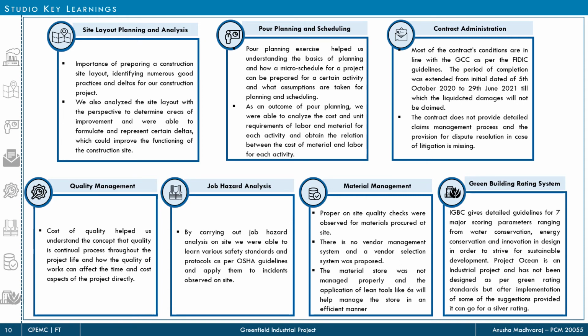And next, in contract administration, we noticed that most of the conditions are in line with the GCC as per the FIDIC guidelines, and that the period of completion was extended from 5th of October 2020 to 29 June 2021, till which the liquidated damages will not be claimed. And under quality management, the concept that quality is a continual process throughout the project life, and how the quality of works can affect the time and cost aspects of the project directly, was understood.